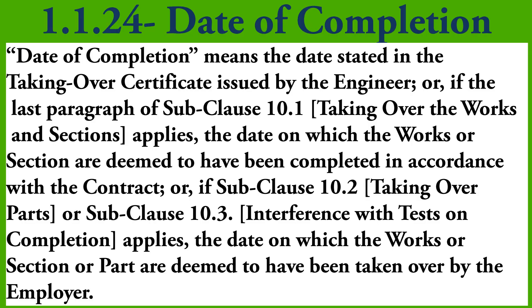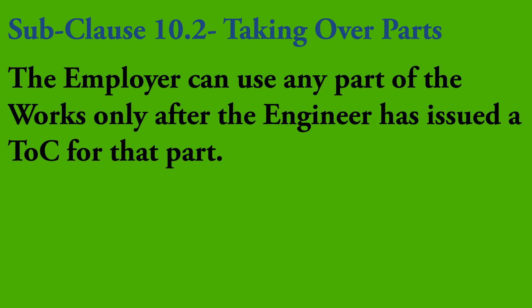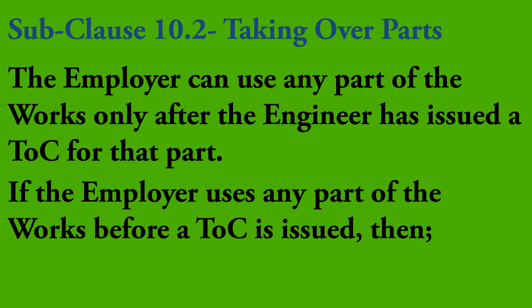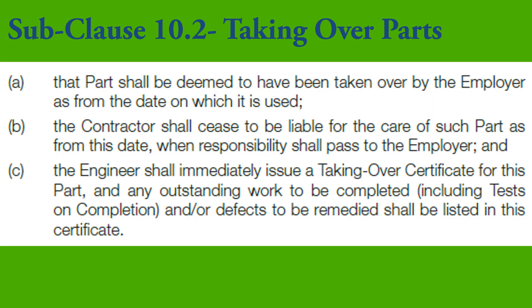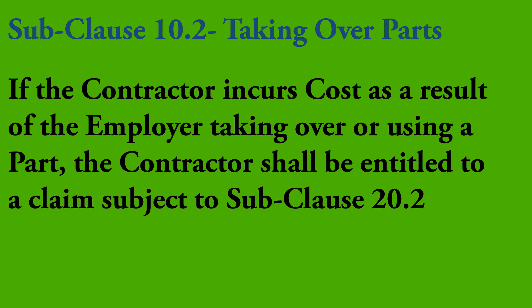The next instance related to Date of Completion is sub-clause 10.2, Taking Over Parts. The employer has the option of taking over and using a part of the works after the engineer issues a TOC for that part. However, if the employer uses a part of the works before a TOC is issued, the date the employer first uses that part becomes the Date of Completion for that part, and the engineer must immediately issue a TOC. The contractor must give a notice to the engineer identifying such part and describing such use, otherwise the contractor may still be liable. If the contractor incurs cost as a result, the contractor is entitled to a claim subject to sub-clause 20.2.